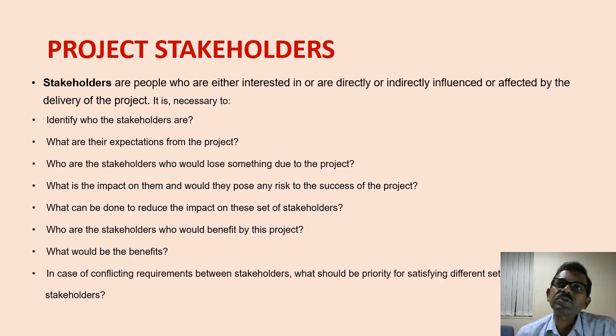Some projects are like a dam, where some people lose their lands, so this is an effect which we have to take care of, and the government has to take care of. They are the stakeholders who are getting affected because they are losing their lands. We have to assess the impact, and then pose the risk factor. Many times there is hesitation due to this land problem, and because of that the project gets held up. That is the risk associated with it.